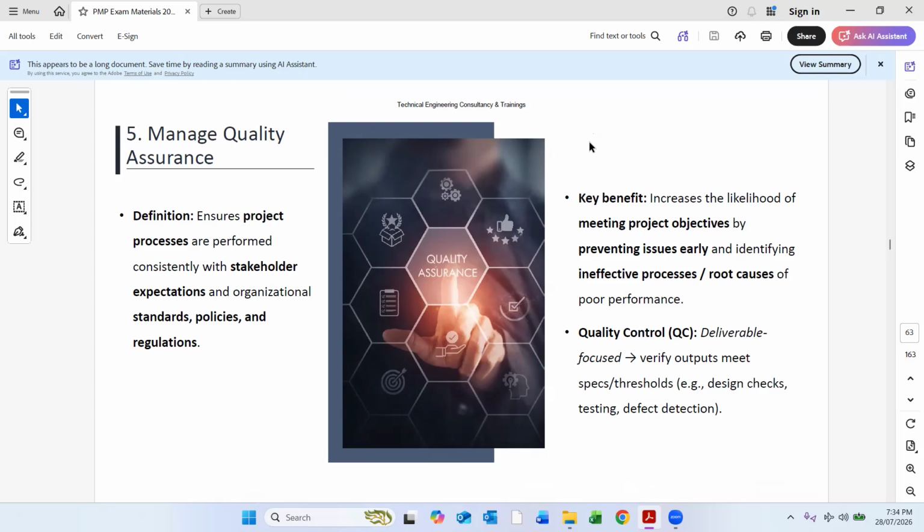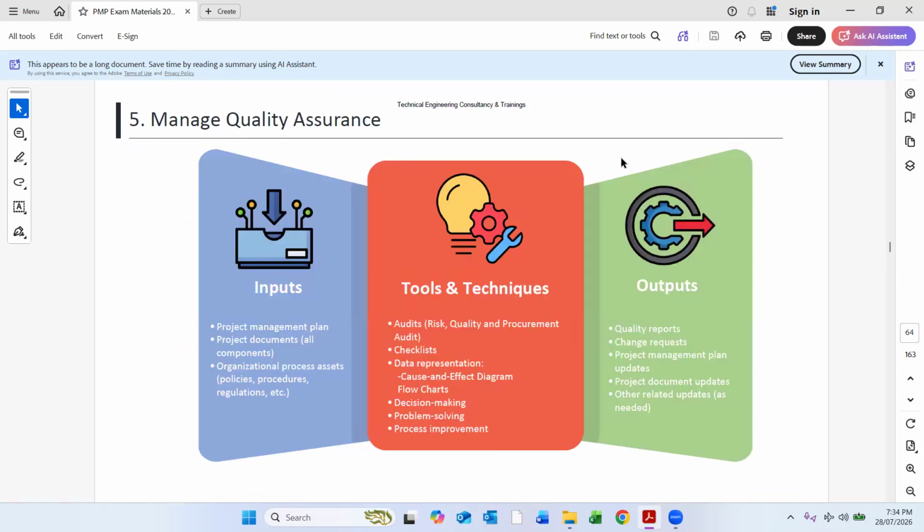And then we have a maintenance period as well, usually for 1 year, where we see that all those activities and work that has been completed is up to the mark of quality. And if there is something, we have to redo the work again. That is the maintenance period, which we can say is the guarantee period for any such type of project. Usually it is for 1 year.